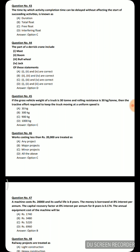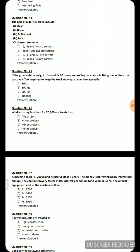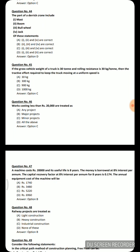Next question: a machine costs Rs. 20,000 and its useful life is 8 years. Money is borrowed at 8% interest per annum. The capital recovery factor at 8% per annum for 8 years is 0.174. Applying the formula, the annual equipment cost of the machine comes out to be Rs. 3,480.